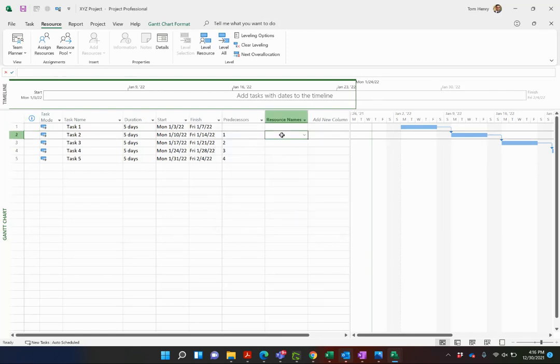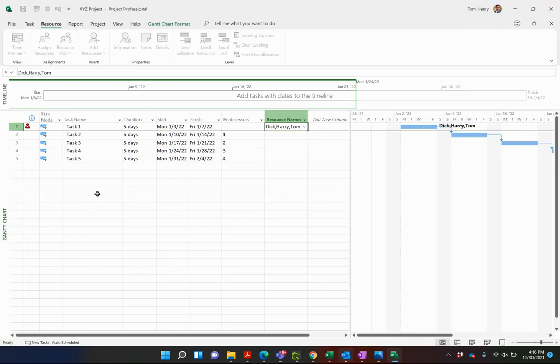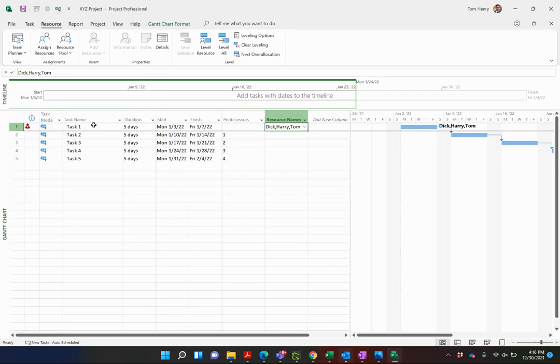And right away, I'm going to come into task one. And I do actually happen to believe that task one is running at the same time as the task one in the other project. So now because we've assigned them in this one, they're not over-allocated in this project, but they are assigned in the other project at the same time. And in fact, I can see that they are now over-allocated and I get the infamous red man.